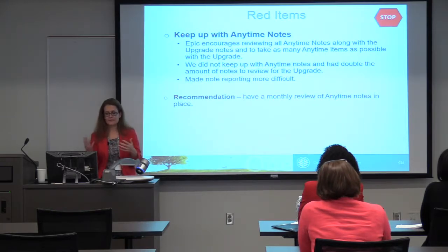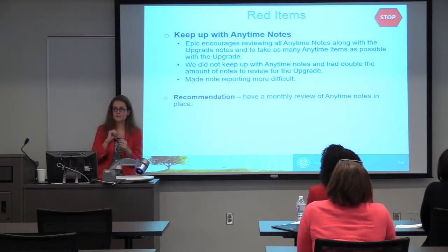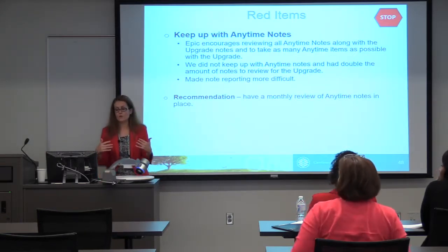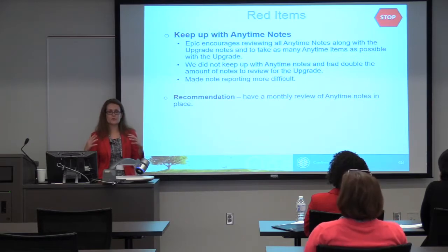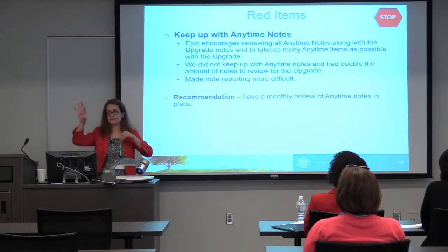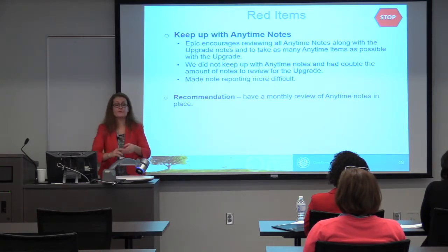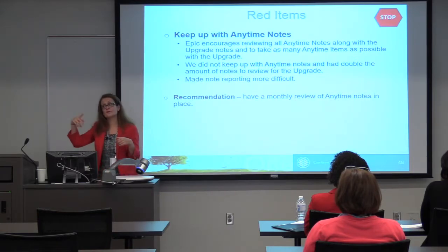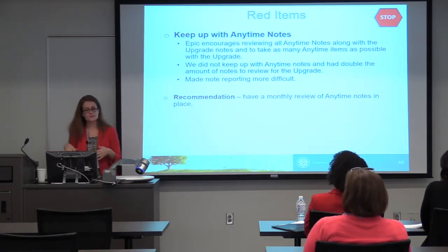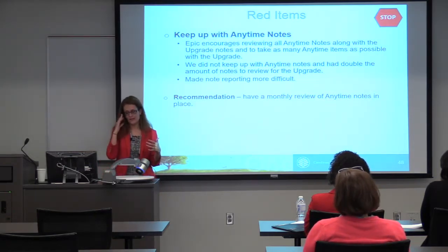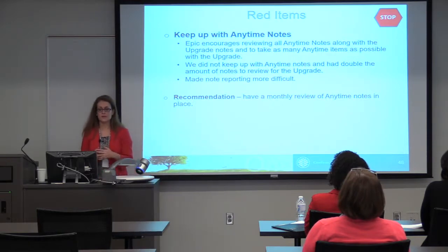Another thing to think about is that it was not only more work for our analysts at that moment, but Christina and I will tell you that the reporting aspect of it was awful. They're in two different places, and you have to report out of each place. To say, hey, you have 1,200 notes you need to review, and they say, oh, I reviewed all my upgrade ones. Oh, no, there's another place you need to go over here and review all these notes. It's very complicated for our analysts, and hard for us to report on, to say you're 50% complete with your review or your build, whatever it may be.